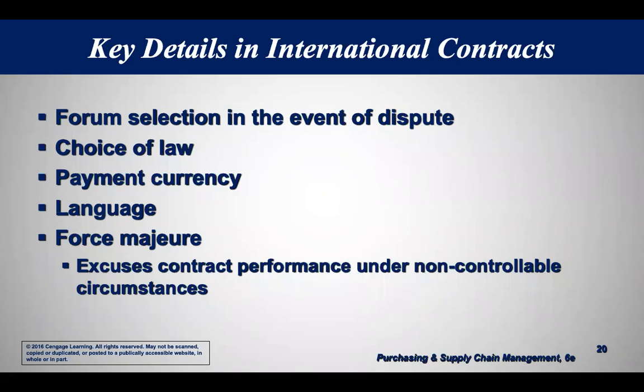There was a very interesting case, which I'll talk about another time, where the language in the contract made a huge difference. The contract can be written in two languages. I have had a contract in Indonesia where the left-hand side of the page was English, and the right-hand side was Bahasa. And we knew that the Bahasa one was the controlling language. So if there was a discrepancy, the Indonesian language would prevail. But of course, we read the English one.